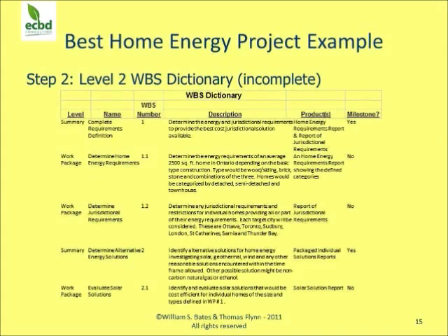You'll also notice it's numbered in a hierarchical numbering system, a decimal system, if you will. Now, once the number 1 was done, then you do number 2, then number 3, and number 4, and number 5, and so on and so forth. Now, if you're in a larger project, you could literally have different teams that were related to those boxes break them out if you wanted to. But they still need to follow the breakdown of the subtrees following the two-step process. So now we have requirements definition broken down into its two work packages. Let's go look at its dictionary.